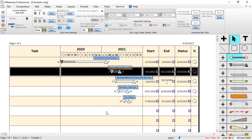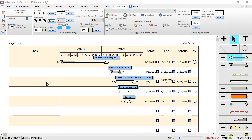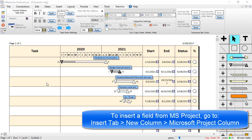And then you can see it brought in those four additional tasks from that MS Project file. At this point, you will notice that none of your task names came in. That is because the task column is not linked to an MS Project field. Let's insert the name field for Microsoft Project.